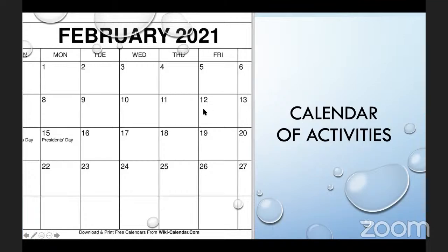So the sprint ends on the 12th of February, right? What happens? On the 15th, we're starting a new sprint. I want you to keep in mind that's how the sprint cycle rolls. First, we start a new sprint, development teams start developing, they start assigning stories to themselves, and by the 12th that sprint should end. And then by the 15th, we start another sprint.